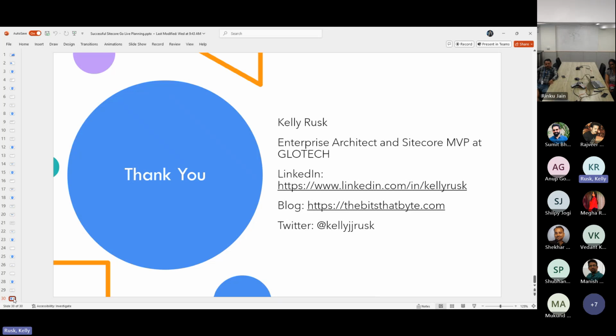But your whole goal to have a successful Sitecore launch is reduce the stress, adopt a soft launch. A soft launch costs more money. So your business stakeholders have to be with you and say, listen, for a short amount of time, we're going to incur cost of having a separate environment. And we're going to be okay with that to reduce risk because we care about our brand.